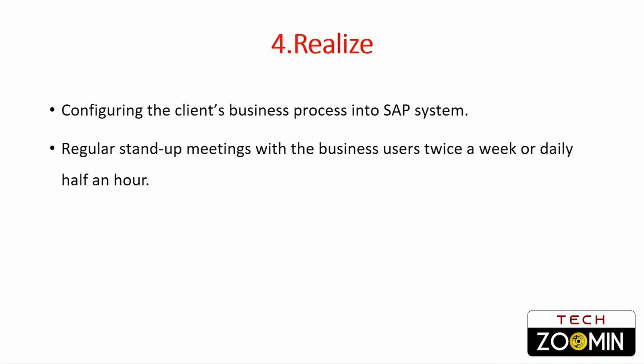So this is exactly what happens in the realize phase of Activate methodology. What I am trying to say is there would be regular stand-up meetings with the business users. It may be twice a week or maybe daily for half an hour. You will have a discussion with the business users. You will tell them what you have already set up in the system. If they feel that there are some changes in the business requirements, then they can comment right there. So regular stand-up meetings with business users are carried out regularly in the realization phase.